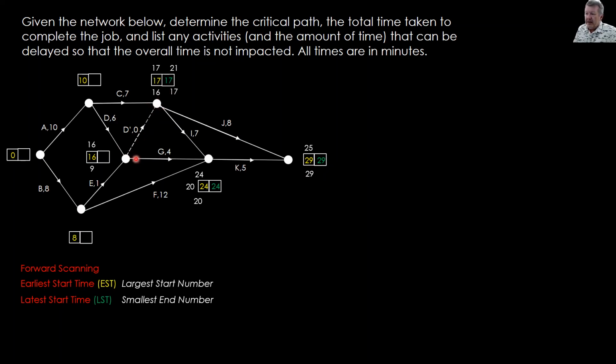All right, let's have a look down through here. Okay, so this has got 3 ways into it as well. No, it's only got 2 ways going backwards. That comes out of it, sorry. 17 take away 0, and the number's going to go up top. So that's just 17. Now this was G, 24 latest start time. Take away 4 is going to be 20. I'll put it just in there so it's obvious. Smaller number is 17. 17 it is.